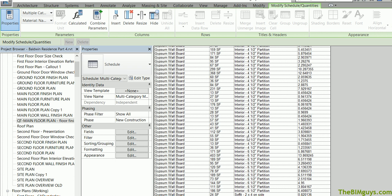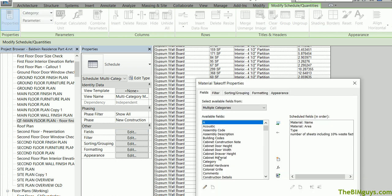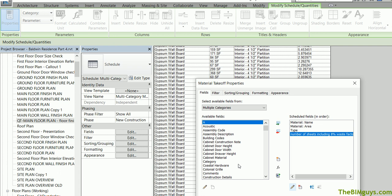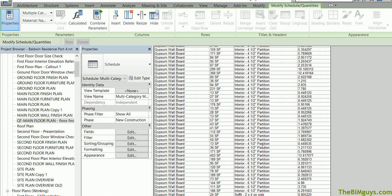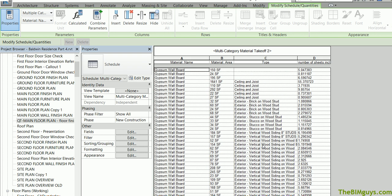Let's say we had 25 sheets left over or 30 sheets left over. You think, well, that's about a few percentages that we had left over. So we may go in here and manipulate this number. We'll edit it and let's say really they're only using they have an 8 percent waste factor. So change this to 8 percent. Come down here and change this to 08. So the next project we do, we run this schedule. Notice it says 534. We hit OK. Notice we're 525. So now we're closer to what we were shooting for before. So you can continue to refine these to make it happen.